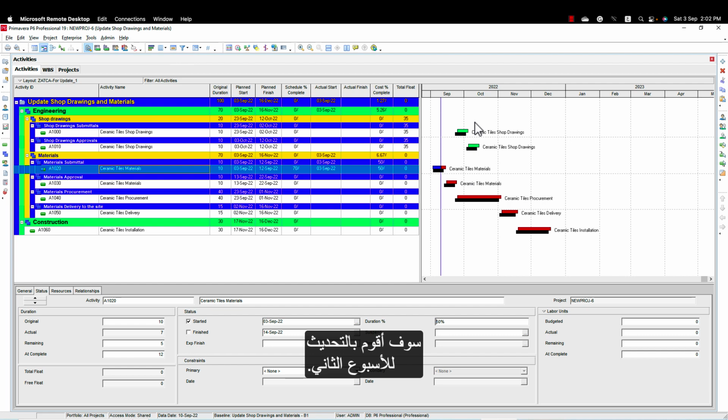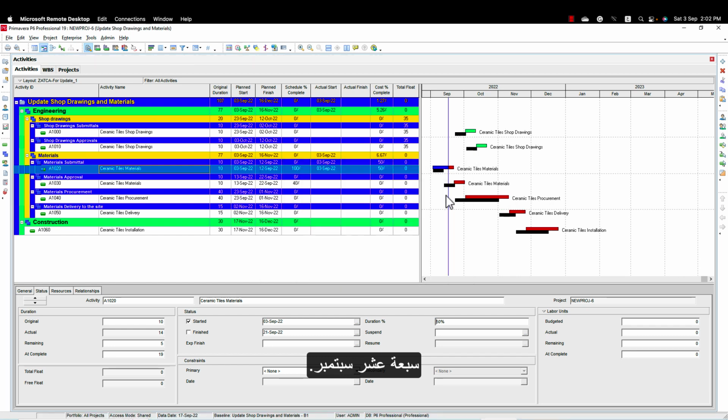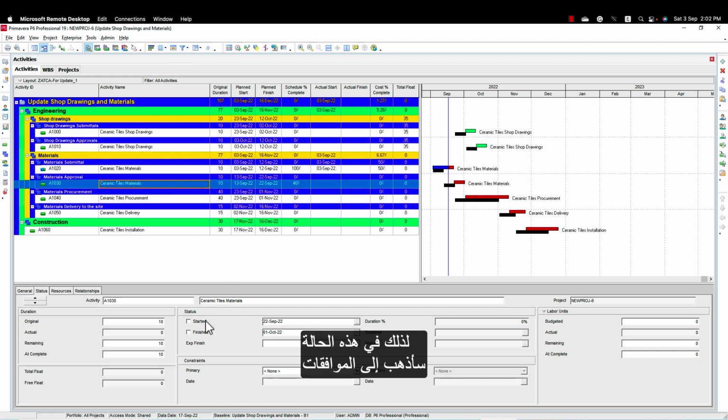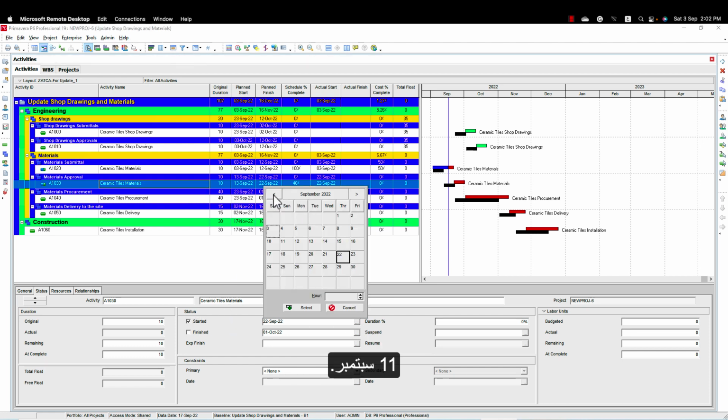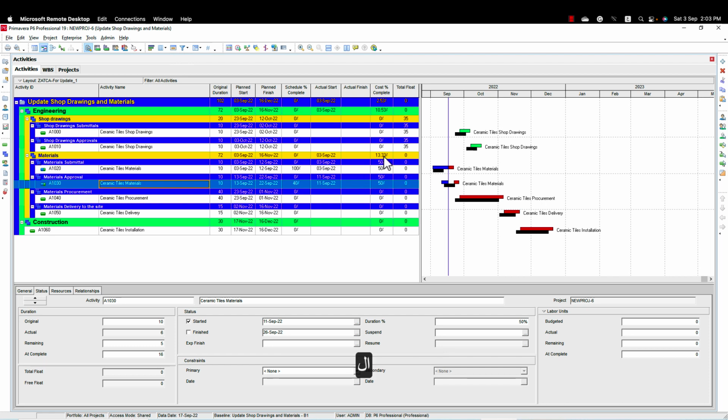Now, I will update for the second week, which is 17 September. And let's say I received revise and resubmit on 11th of September. So in that case, I'm going to the approvals and put the start date 11th of September, okay? And here I'll put 50% in the approval. Now I don't have either the submittal or the approval completed 100% because I'm not yet getting the code B or code A for the material.